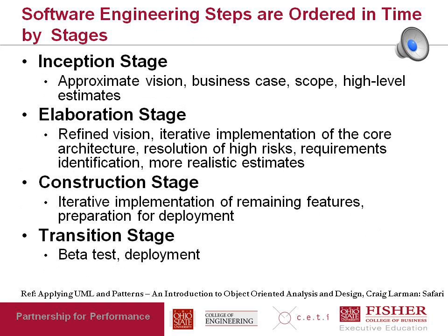In reality, software projects progress through stages, and the stages are shown on the slide here. So a typical software project will begin with an inception stage, essentially a stage in which things are being figured out. So the approximate vision of the project will be identified. A high-level business case will be put together. A high-level scope of the project will be defined, and there will be high-level estimates with respect to how long it's going to take, how much time can be expended, and so on.